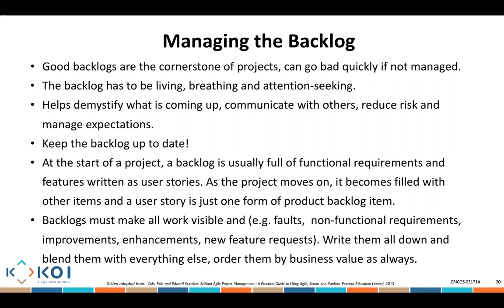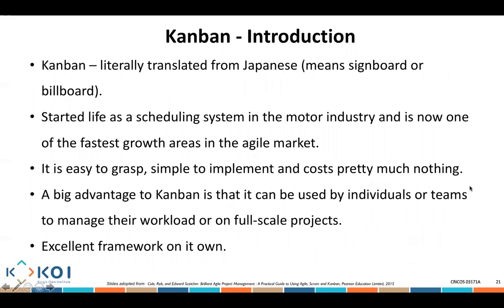We'll have bugs, faults, non-functional requirements, for example relating to documentation, potential enhancements you might have found, and new feature requests, which go beyond the original requirements you identified. Write them all down, blend them with everything else, order them by business value, which one is the most important, and ensure you work on them accordingly.